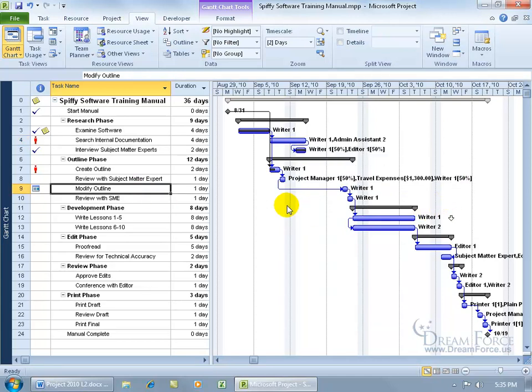In a perfect project, it'd be nice to have one task finished, then start the next one, then start the next one, and not have, well, start this one, and then go ahead and start this one about the same time, and then this one can be delayed. Because notice that this one can slip out before it affects the end date, because no other task is tied to it. So I do this because I want you to go ahead and do some critical thinking on your own when you look through this and go, hey, this wasn't the same project we started in level 1, but something you can pull off to the side and go, if I was project manager, let me try to figure out and work on these exercises.